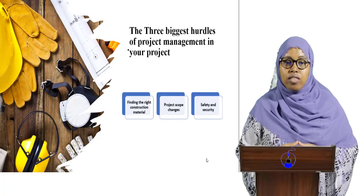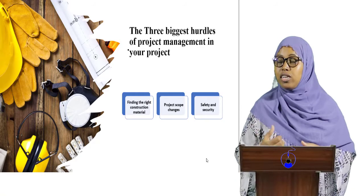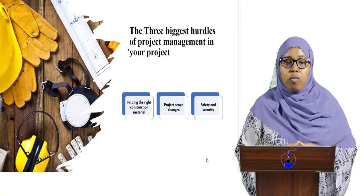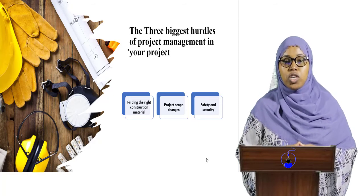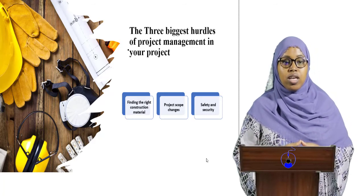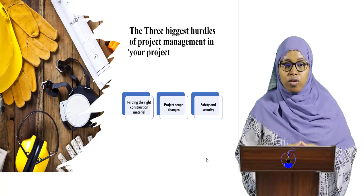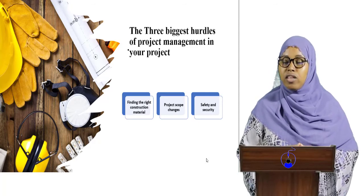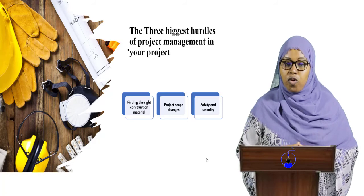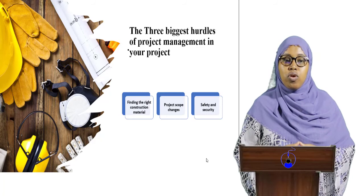In this case study, there are three biggest hurdles. The first challenge is the availability of construction materials for building modern apartments, including decoration items and construction machines that needed to be ordered from outside the country. The second was a last-minute change in scope — the client requested additional floors after construction had already started. The third is safety and security: since one of the project managers was a foreigner, he needed to hire a security guard, which caused delays during implementation, as Somalia is not a secure place.